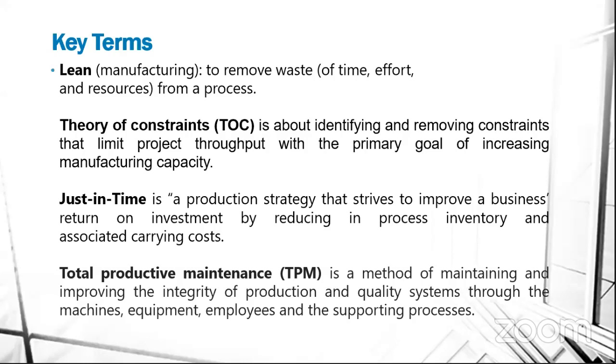Now, this total productive maintenance is you giving attention to the maintenance of your equipment, because if you don't give attention to maintenance of equipment and those equipment get bad along the line when you are carrying out the project, getting those equipment, to hire those equipment will cost you more, and again your schedule will be affected together with it. So you have to give consideration to that also.